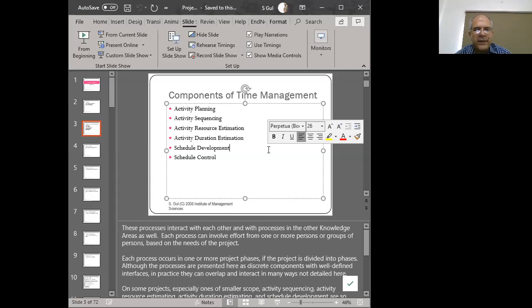So once we know the activities that we have to do, we know the sequence amongst those activities, meaning we know what comes before and what comes after, and we know the duration, now we can start thinking about the network diagram. We basically take that sequencing logic and put it in the shape of a diagram so that we can see where those critical or important activities reside, so that we can manage our project better, right?